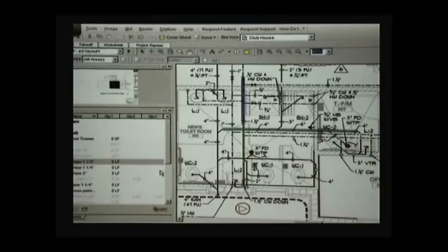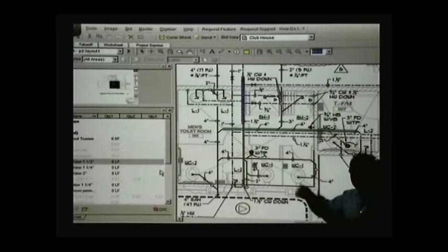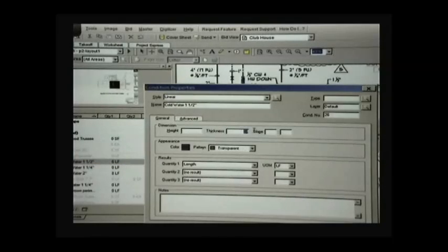But if you think that you will get this job, then you want to be careful with the different estimates for the diameters, because when you go to buy the materials, you already have a good takeoff. You want to be as accurate as possible. Exactly. So that's what I'm trying to do here. I'm trying to estimate the different diameters and have each one of those identified ahead of time.